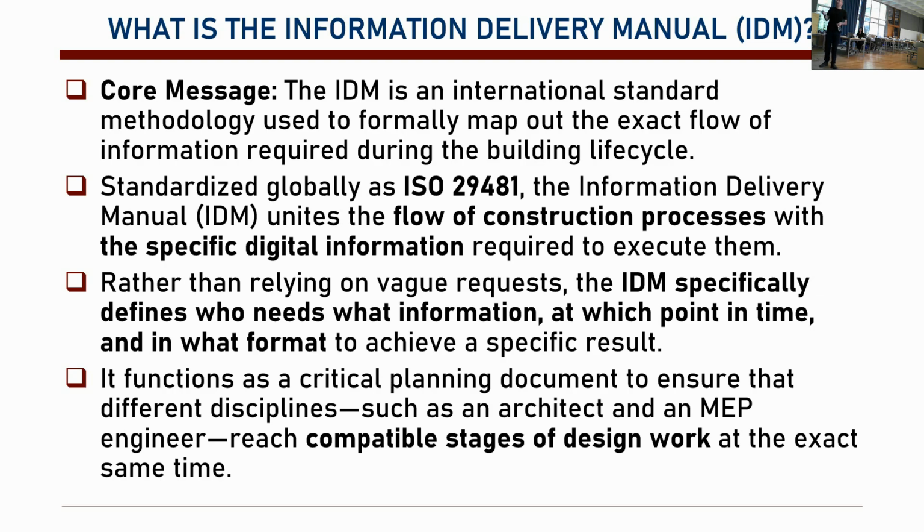So, what information? This information. Who? The structural engineer. And when? When they start working on the structure. And in what format? In that regard, the architect could say, well, we will provide it as a Revit file, or an IFC file exported through Revit, whichever they prefer. Sometimes some projects say that the exchange will be strictly on IFC, very simple representations.